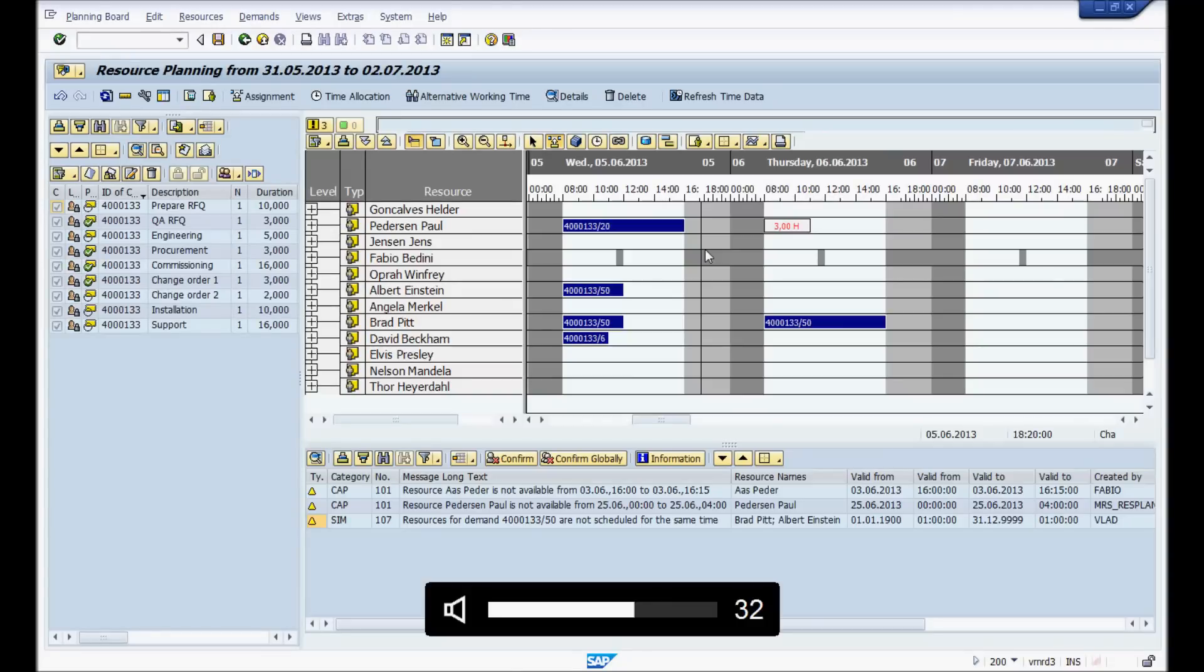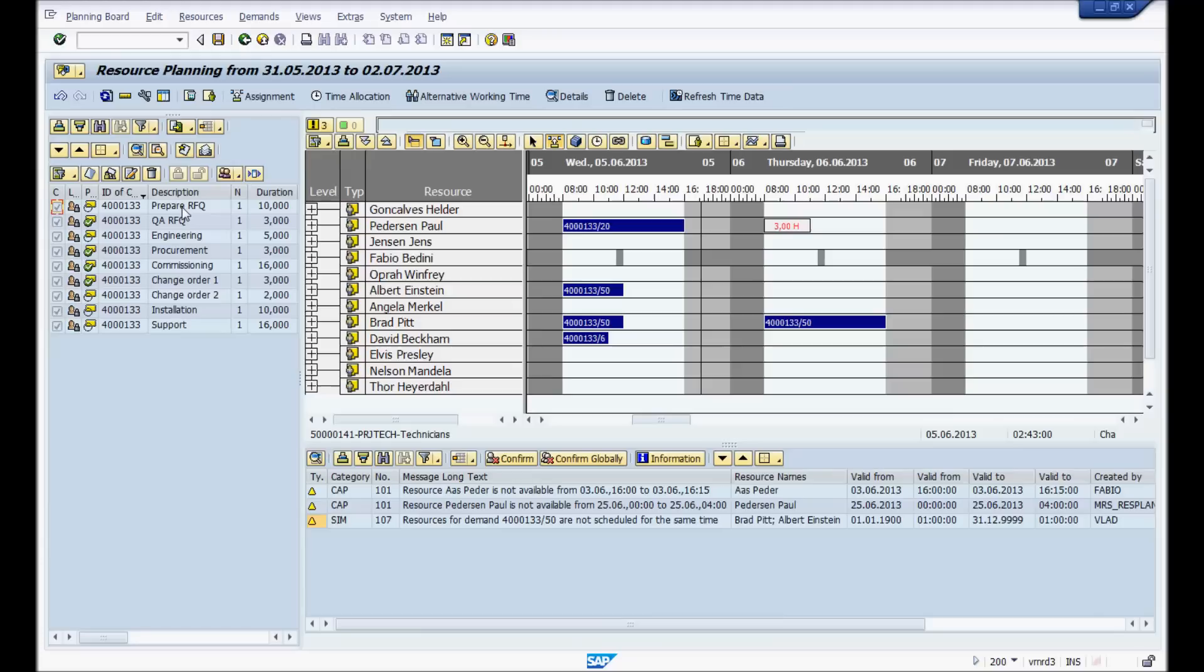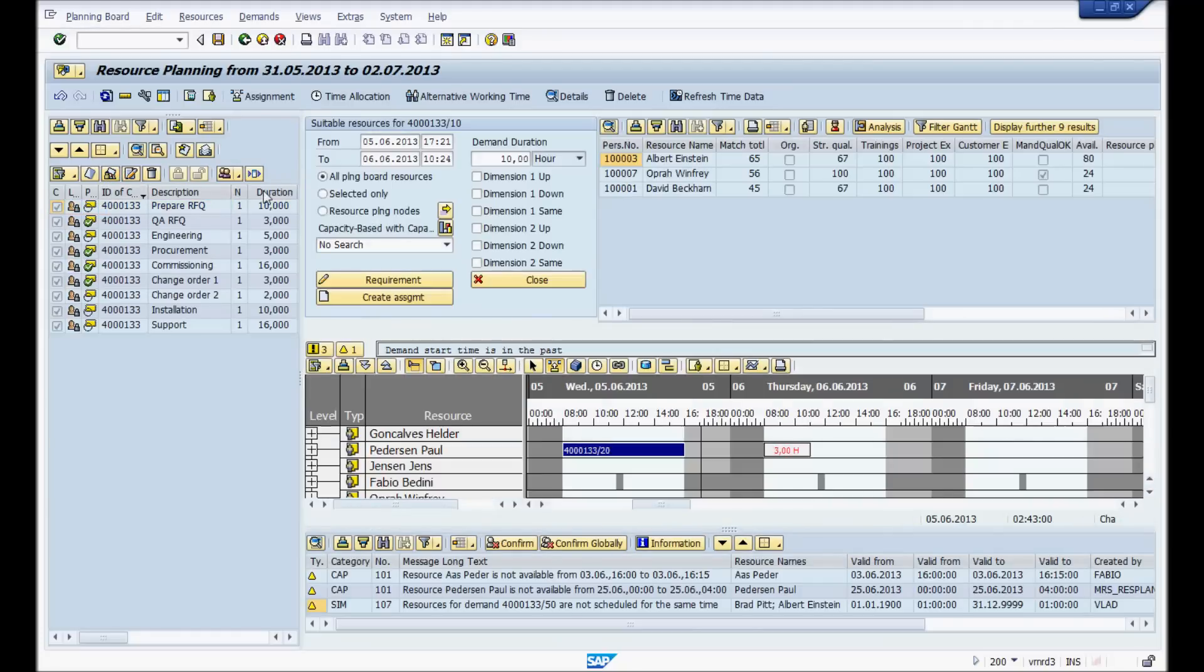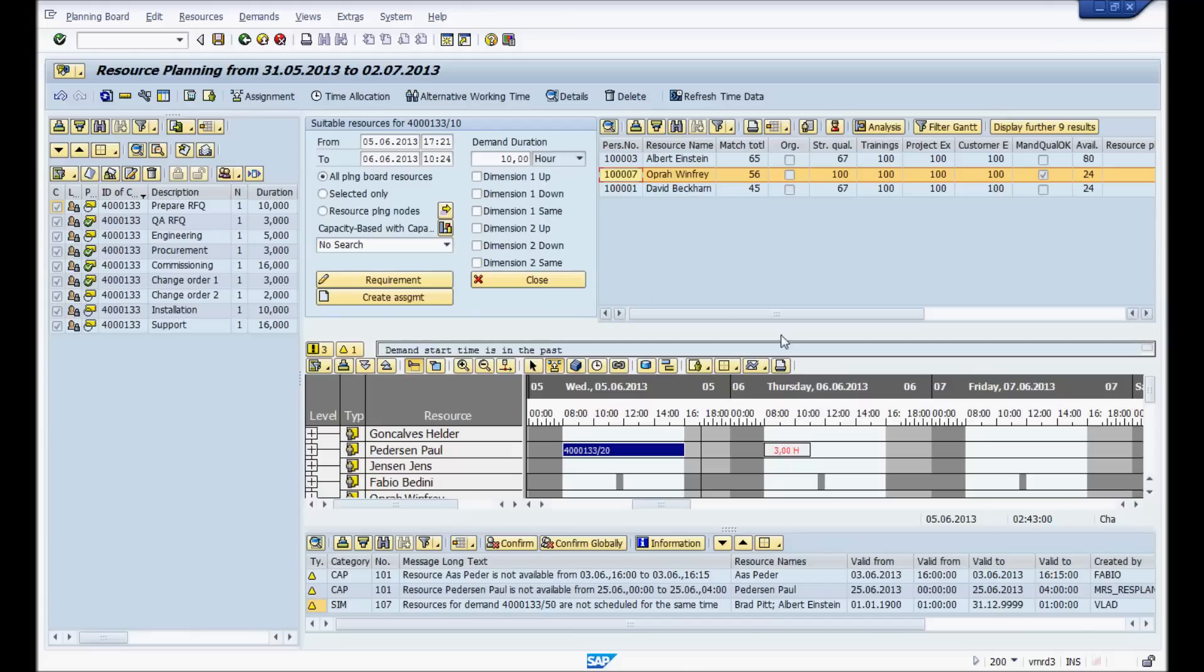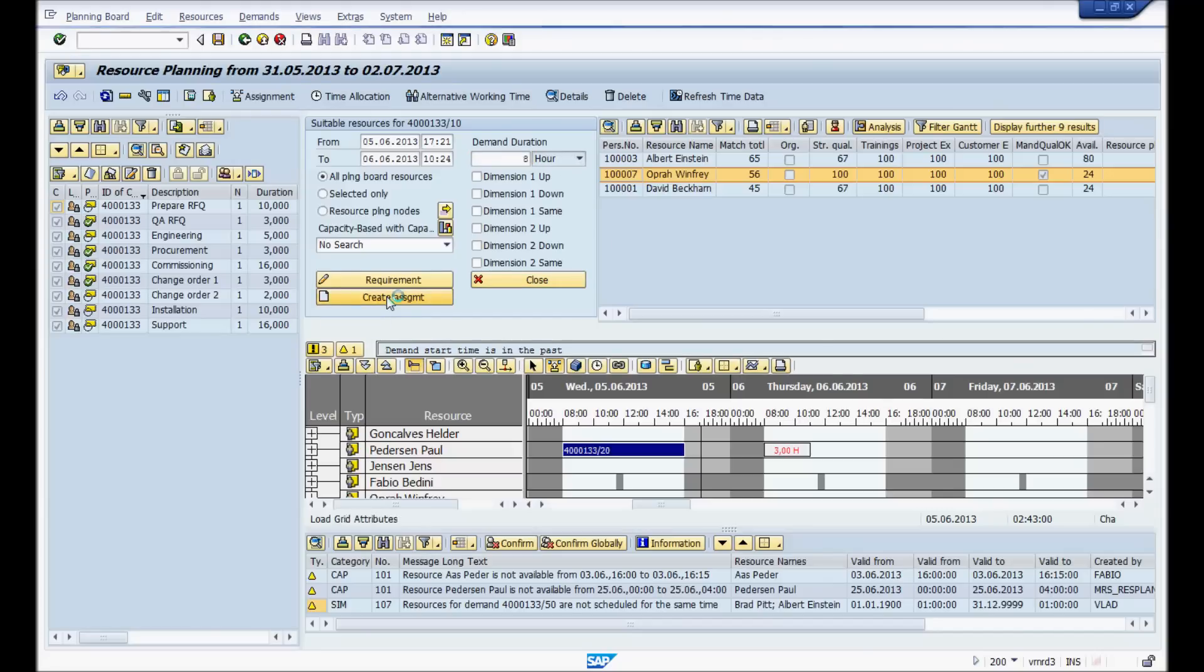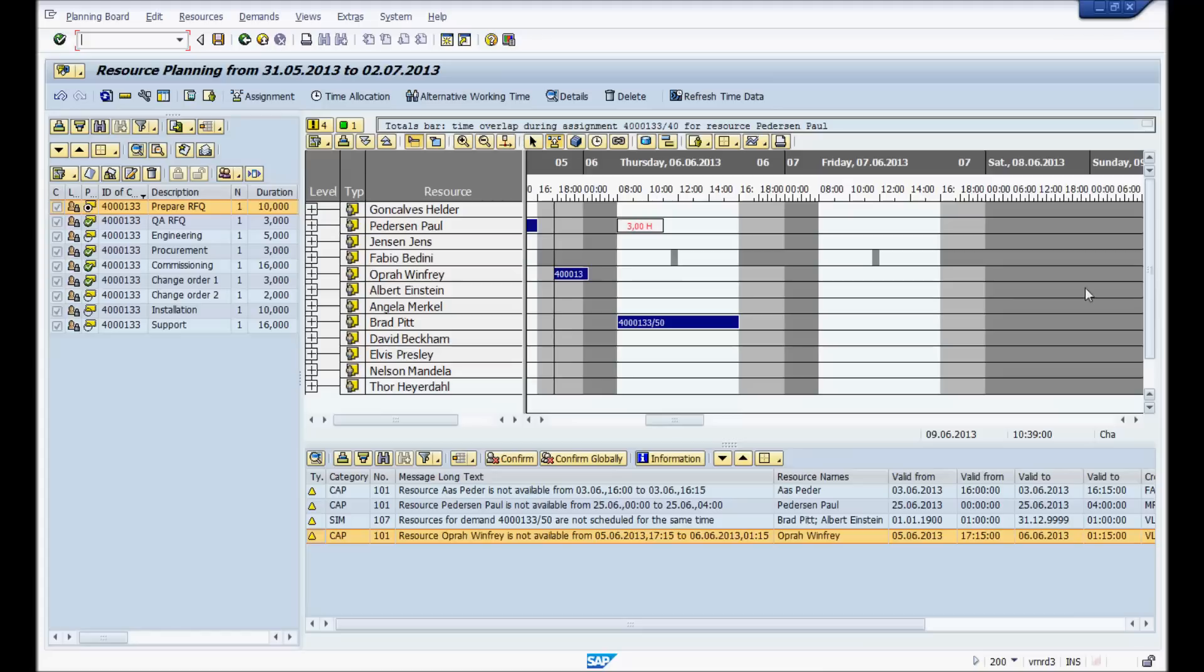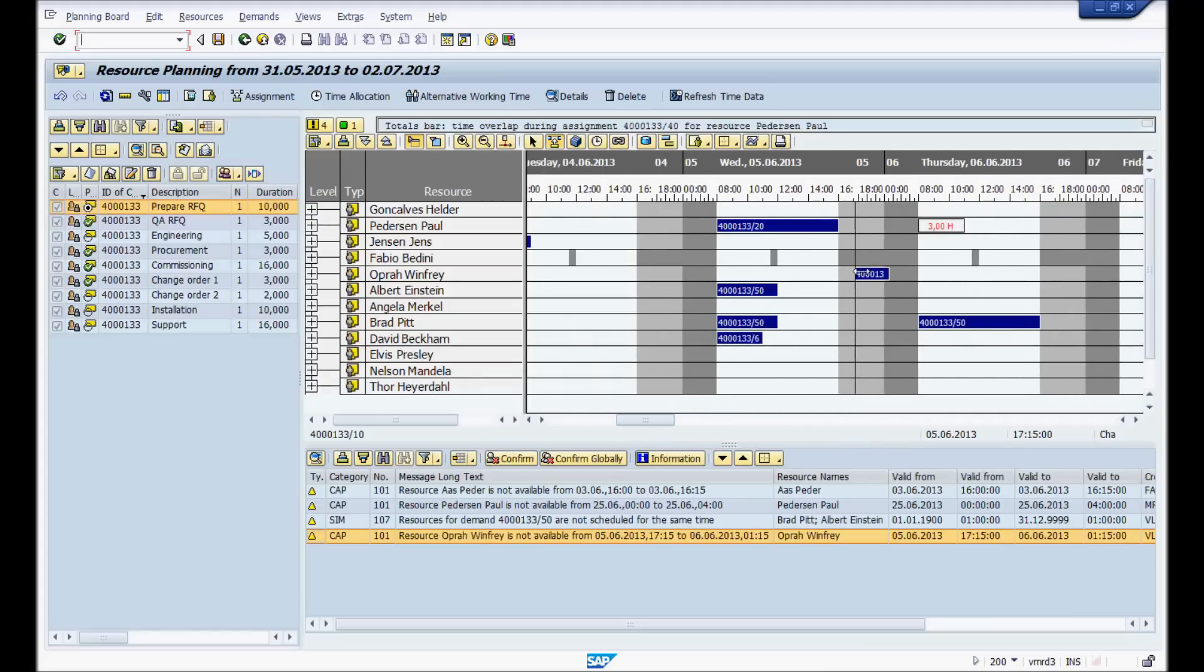Sometimes you have operations that require special qualifications. For example, here we have prepare RFQ. As you notice, when we looked at the project, you need a qualified project manager. In MRS, it allows you to find people quite quickly. You just highlight the demand. Click here, suitable resources. It will tell you who are the suitable resources. So right now, Oprah has a hundred across all items, except for availability. But this is a very important task to prepare the RFQ. So we'll make her available. Also we'll say that since she's so qualified, it only takes eight hours. So we'll create the assignment right from here. It'll assign it to Oprah automatically. Here it is. Drag it to Wednesday. Perfect.